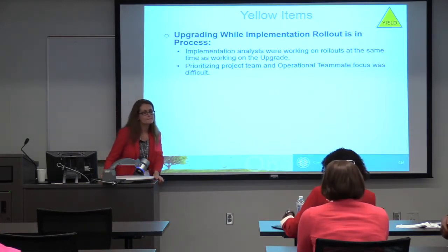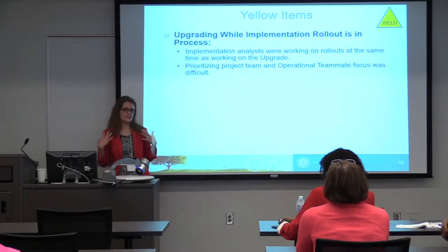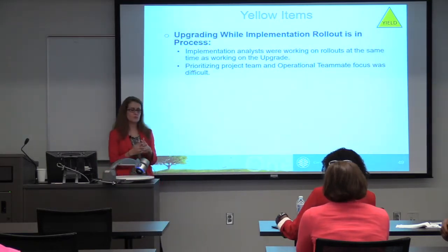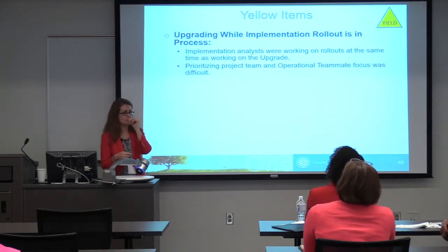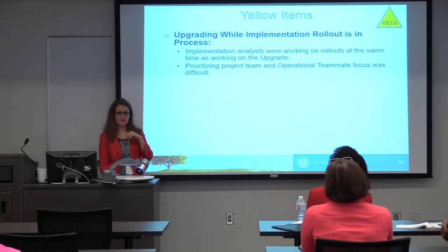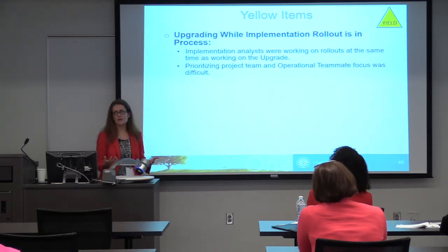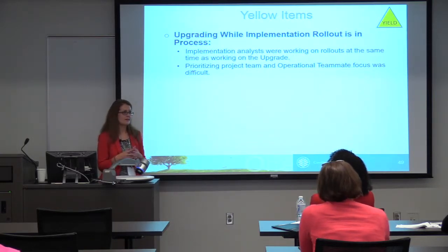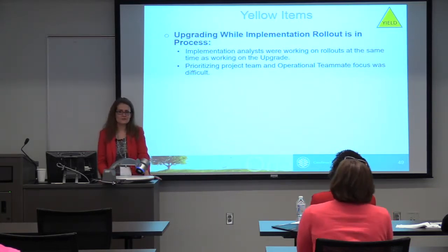So wasn't it possible to work in parallel teams, like some of the analysts focusing on the upgrade, some of them focusing on the other work? We somewhat did that. We had our upgrade team, which was primarily about two teammates from each work stream. But they were also subject matter experts in that prod issue that we had, so it was very hard to get their 100% full focus. It would have been great if we could have said, don't work on anything other than the upgrade, but it wasn't reality for us.